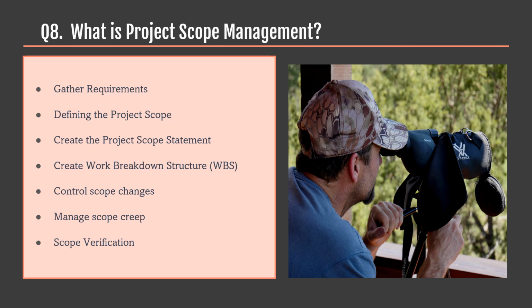Throughout the project, Mary had to control the scope changes. A couple of months after the development started, Mary got a request from Jane to integrate a payment gateway, which was decided as a pay on delivery option earlier. Mary carefully assessed the impact of this change on the project's budget, schedule and resources. The change didn't align with the project objectives and hence she convinced Jane to defer it to a later version.